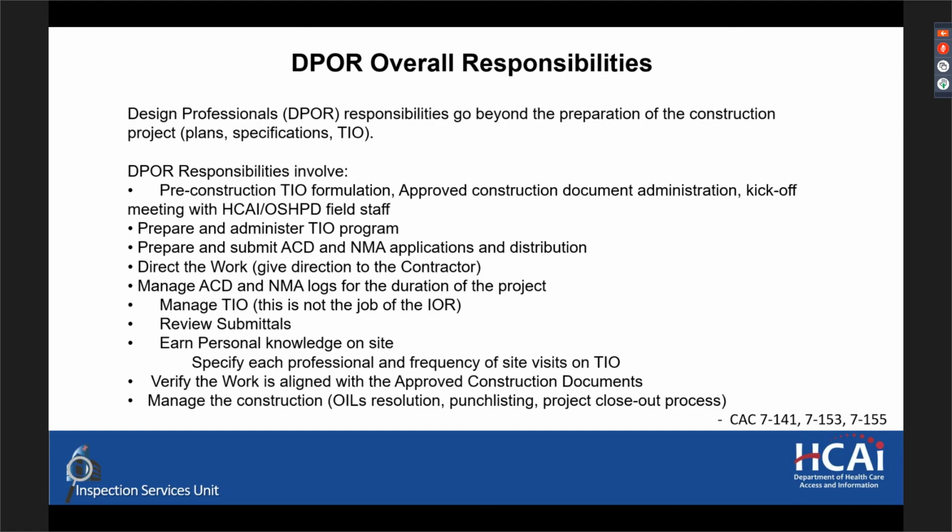So as the project changes as a result of RFIs or submittal requirements or client requests, the submitted ACDs and NMAs shall be tracked by the design professional of record, presented to OSHPD field staff at request by that field staff person, and should be an active living document for the duration of the project.